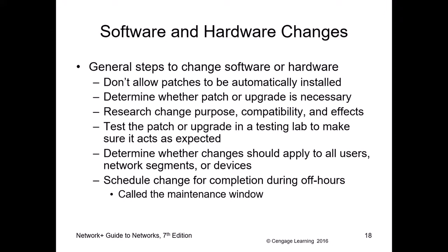Test the patch or upgrade in a testing lab if you can do that. You should definitely do that before you go live. Determine whether the changes should apply to all users, network segments, or devices. Does everybody need the upgrade or not, in other words? Schedule the change for completion during off hours. Of course, you want to do it on a Saturday night after midnight into Sunday where there's nobody really having any access.